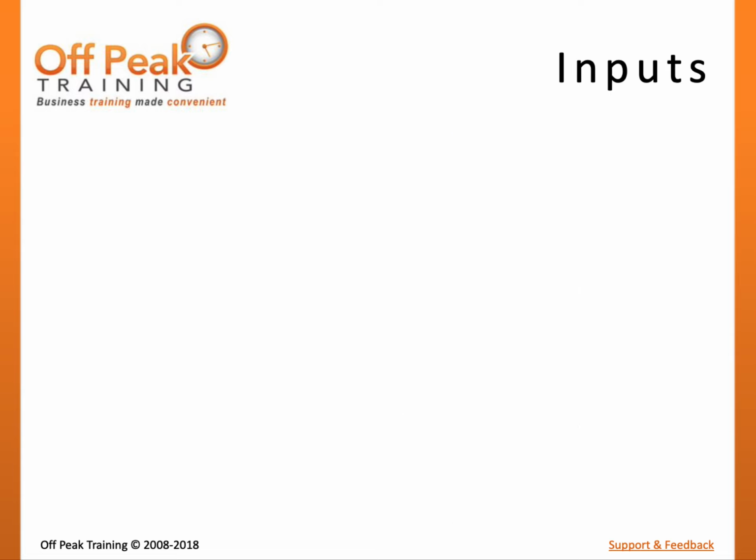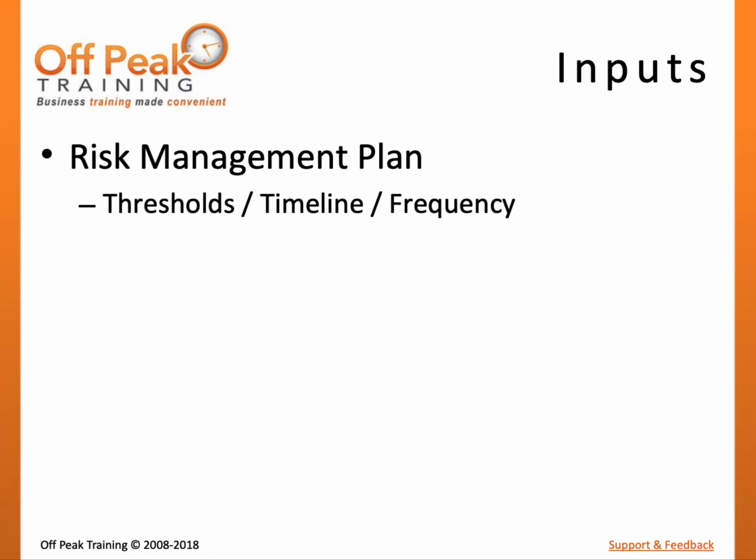One major input to the Plan Risk Responses process is the Risk Management Plan. This document should describe the planned approach to performing this process. Since risk planning is both sequential and iterative, the Risk Management Plan should describe when the project team is ready to begin planning response and under what conditions they will have to revisit identification and analysis. This may include a timing component that describes the planned interval of revisiting the process. Further, the Risk Management Plan should describe the roles and responsibilities of project stakeholders in response planning.